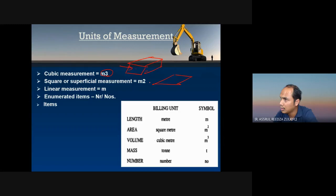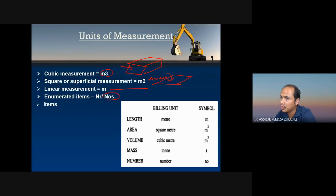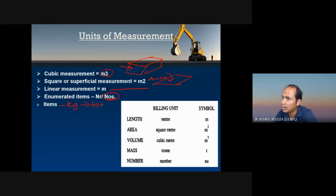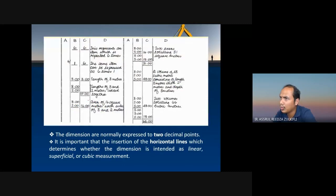You need to calculate in cubic meters, meter square — that's the area form — and then linear meter, which is length. And then enumerated items are in unit numbers. These are the typical units of measurement we use. Another unit is the tonne — we convert from kg to tonnes: 1000 kg equals 1 tonne.